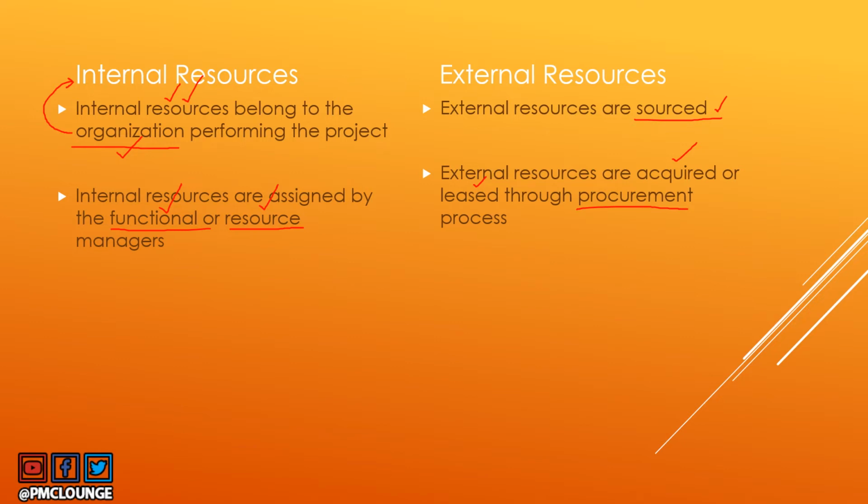So I won't delve deep into the procurement process here, but you need to understand that external resources are sourced and they could either be acquired, in terms of, let's say, hiring a new person or buying the hardware, the IT infrastructure required for creating an environment or something of that sort. Or it can be leased, hiring contractors or leasing IT infrastructure for a certain time period, normally the time period of the project.